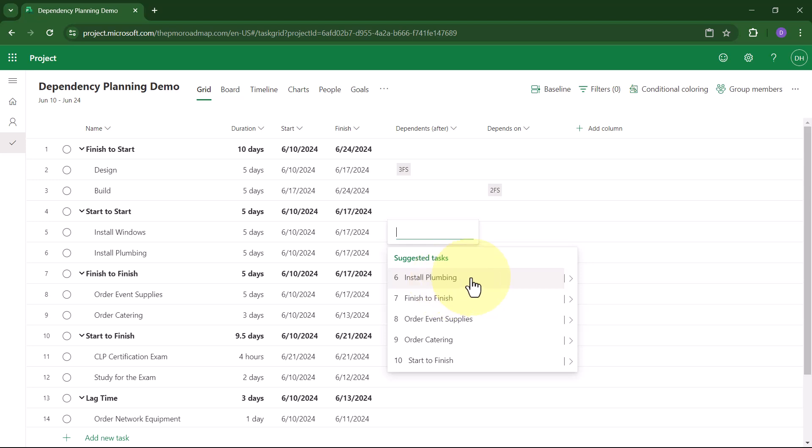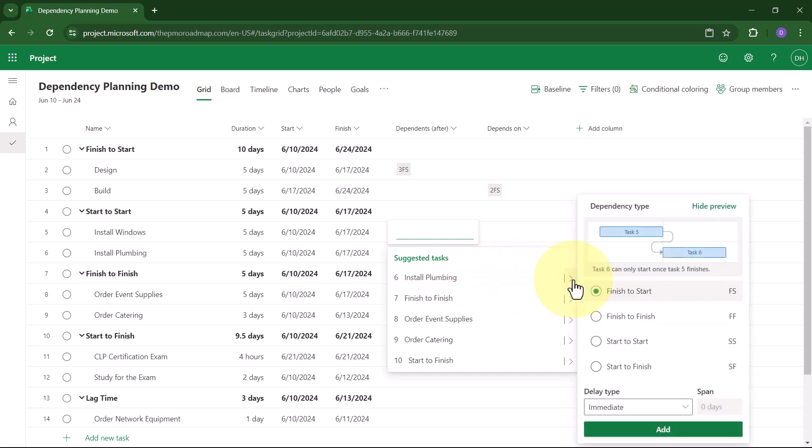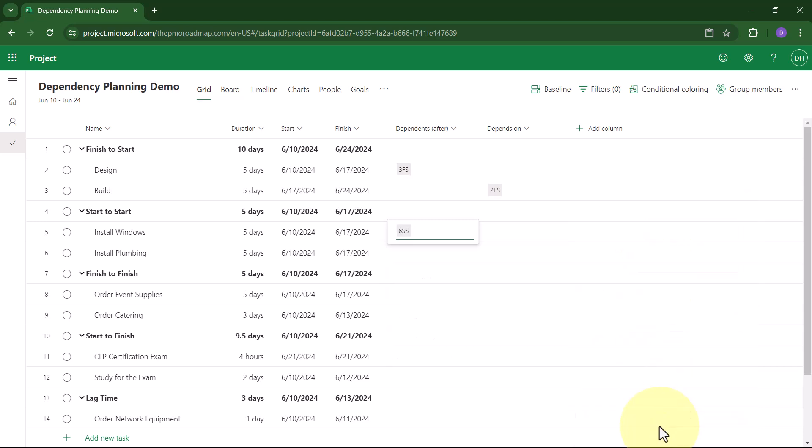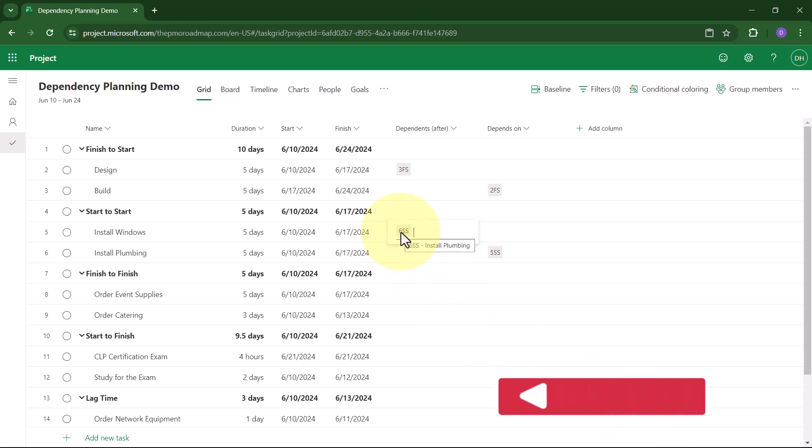At the end of the task row, when you click the Flyout button, you see a flyout dependency type dialog. Here I can choose Start-to-Start. I can even see a nice little screenshot of what this will look like, and then click the Add button. And that creates the dependency type Start-to-Start.